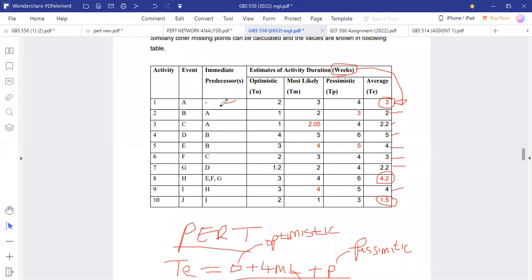Okay. So what if there was a letter there? Yes, like so. Meaning, if you can see the second component here, it means that activity A was done before B. So B was a following activity, followed after A completed. Oh, okay. So meaning that after A completed, that's when B started, and at the same time, after A completed, that's when also C started.